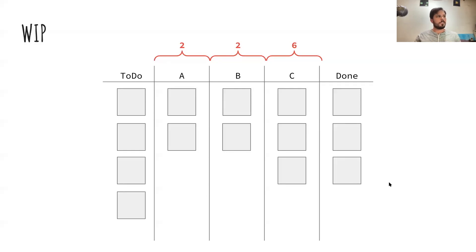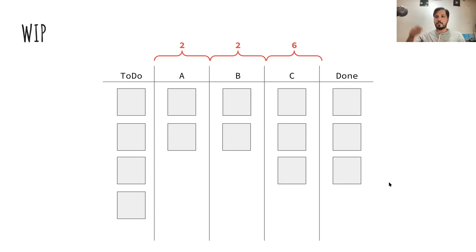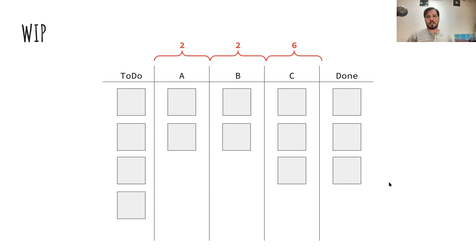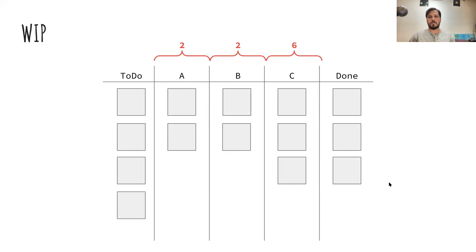Even if you change the WIP limit to six and you're under it, if you're varying between zero and six, you're still not controlling WIP. There's a lot of variance that can cause issues with your cycle time, throughput, and predictability. I think of WIP limits as WIP targets — this is where we want to be. We want to be at six things or three things or wherever we agreed. If we can stay close to and consistent at those numbers, we're working towards predictability.